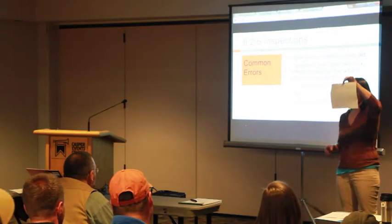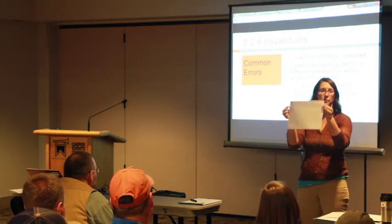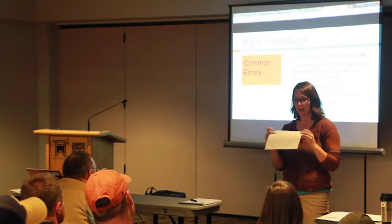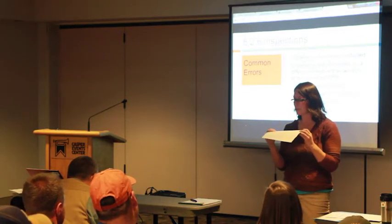And then the other big one, not quite as many people miss this, but I have a lot of them missing this. You have got to have the certification statement, and it's outlined in the permit, and it is this one that's word for word. This one's actually national, so the one we have in our permit is the same as what the EPA has. So if you're doing projects out of state and you're under the EPA, or if you're on the reservation doing projects, this is the same certification statement. And then it has to be signed by either the permittee or the authorized representative, the person you said could do your inspections. Make sure you have those.